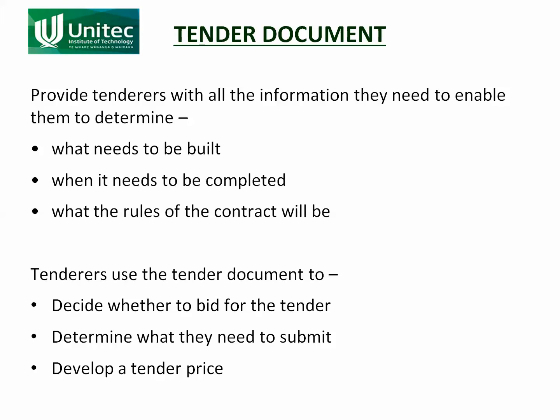If they don't have enough information, then they may not tender, or they may put a higher price in than they would have otherwise. So it's important that the tender document is as accurate as possible.